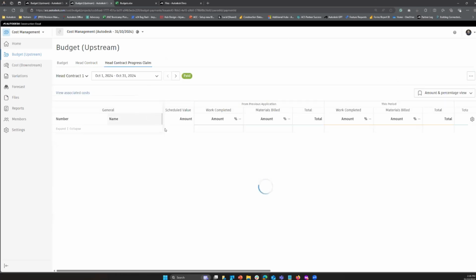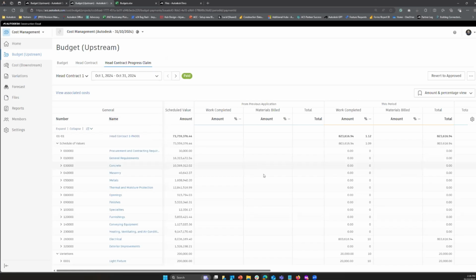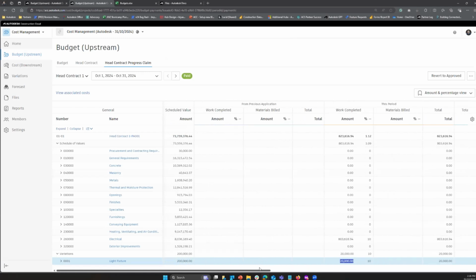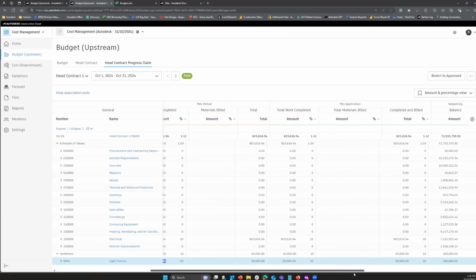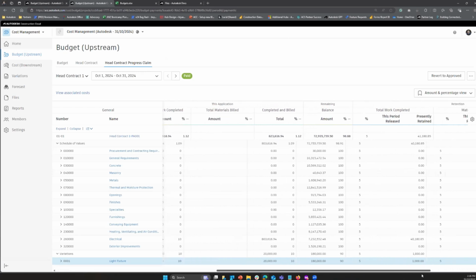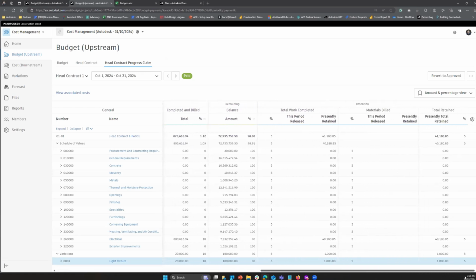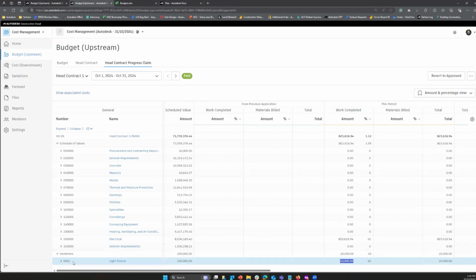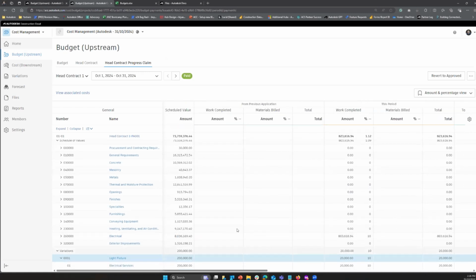And there's already a claim that's been paid here. So if you look here, this period, we have work completed 10%. So you can see we have an ability to track what's being paid in this period. And this is obviously from the first payment application of the platform. And we'll go through and create a second one as well, just to show you how that information is tracked. But all this information is logged on screen. All the information in detail is trackable and linked.